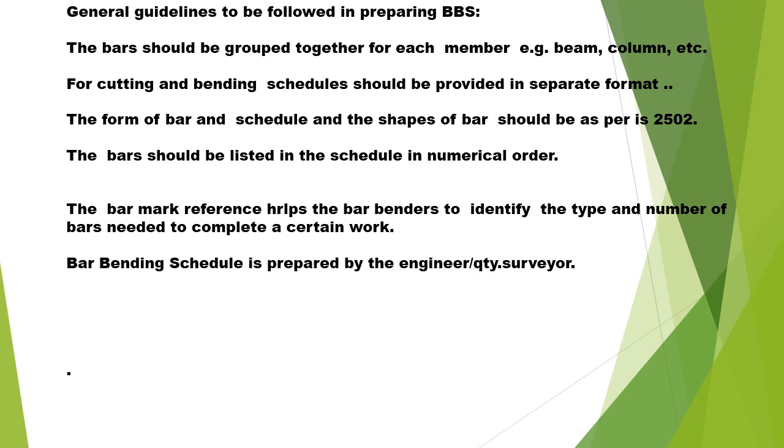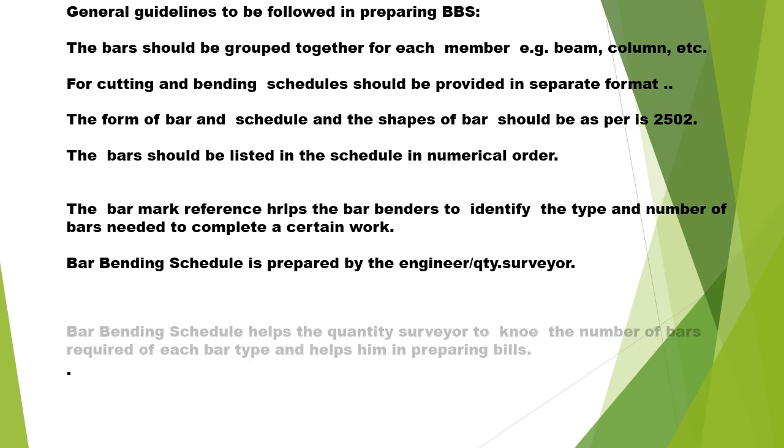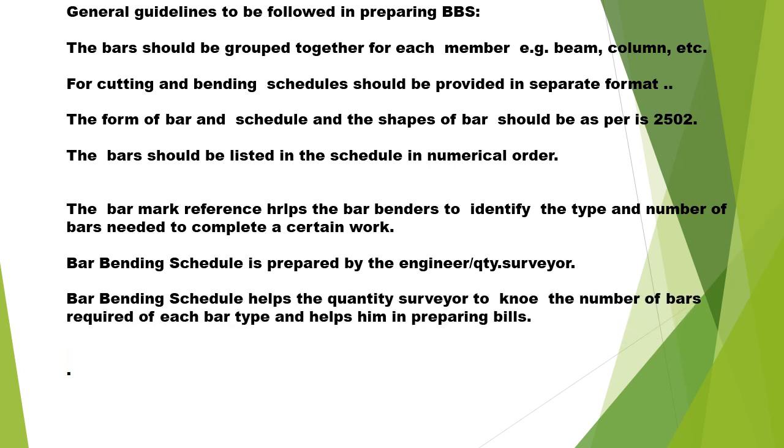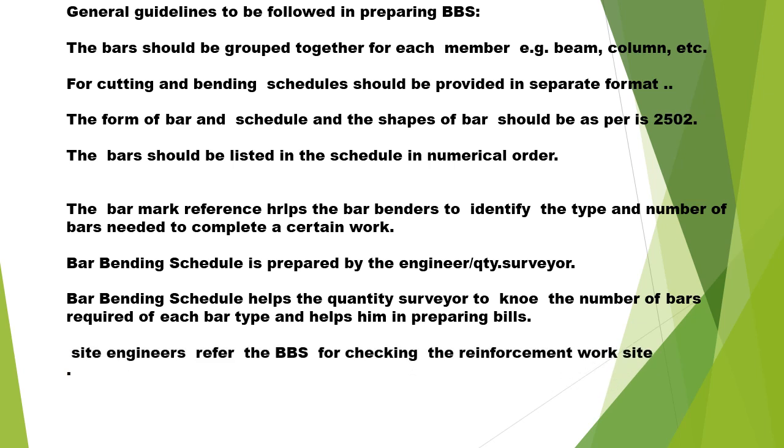Bar bending schedule is generally prepared by an engineer or a quantity surveyor. It helps the quantity surveyors to know the number of bars required for each bar type and helps them in preparing the bills. It also helps the engineers to check at the site regarding the bar positioning, etc.